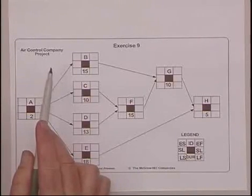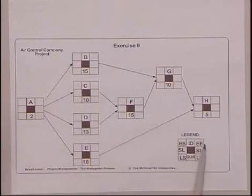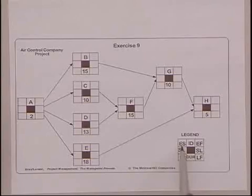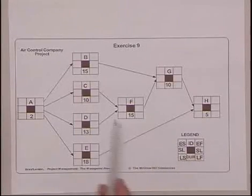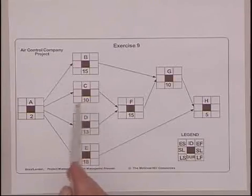The first thing you should do when you look at a diagram like this is review what's on the legend. The legend contains early start, early finish, late start, late finish, duration, slack, and the ID. Right now all we have is the ID and the duration.